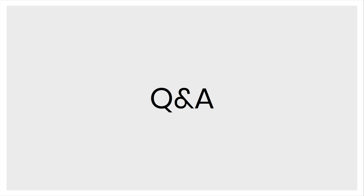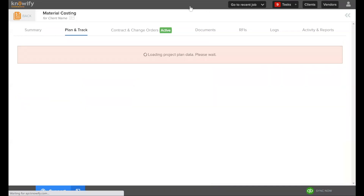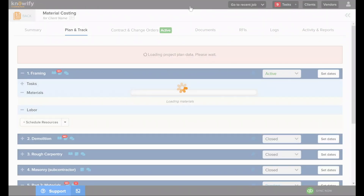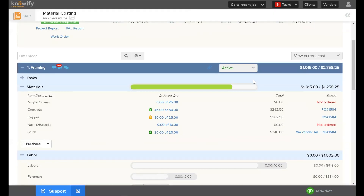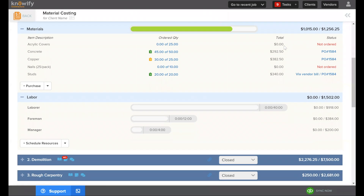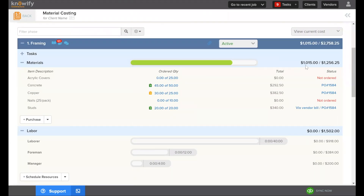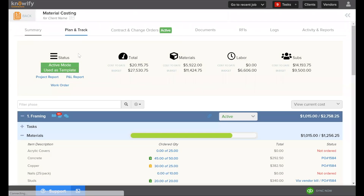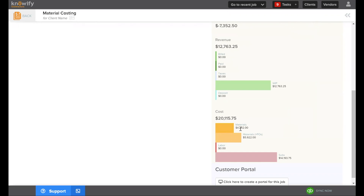Can Knowify show the difference between budgeted and actual price? Yes — in the Plan and Track section, the left side shows actual cost and the right side shows budgeted cost, separated by phase and materials. The cost-to-date summary using materials and POs always uses your actual cost. Your budget is used for planning and calculating the WIP number.